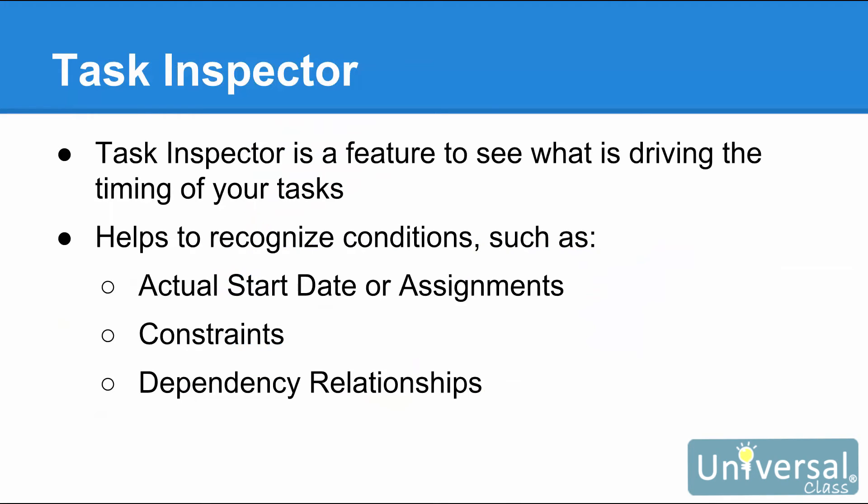The Task Inspector is a feature that lets you know what is driving the timing of your tasks. Since the timing of your tasks is affected by certain conditions, Task Inspector will help you recognize these conditions. The conditions that can affect timing include: the actual start date or assignments — when you've entered a start date or assigned a resource that isn't yet available; constraints — when a constraint is applied that won't allow a task to start until a certain date; and dependency relationships, where a predecessor task can cause a change to a task's timing.